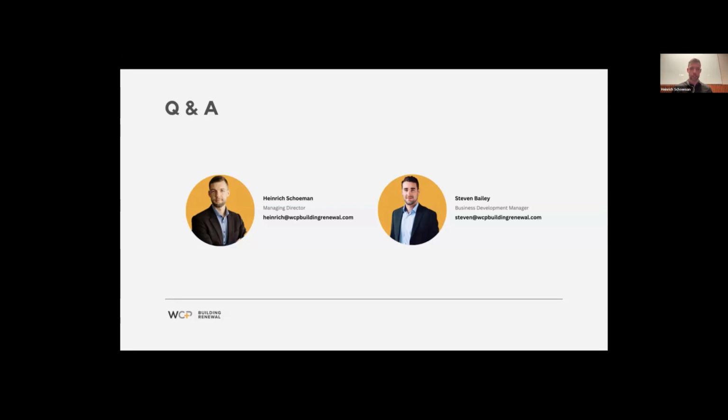If there's a misalignment, you're in person, looking at the property, and you address that together. You say, great, okay, this is it. You refer back to the scope of work, to the approved proposal, and you get aligned. Have we delivered on this? Has this been finalized or not? If not, then there's an issue and that needs to be addressed and confirmed. That's the process you go through.